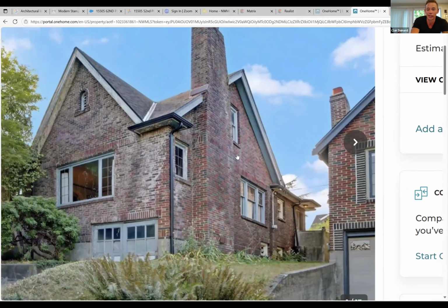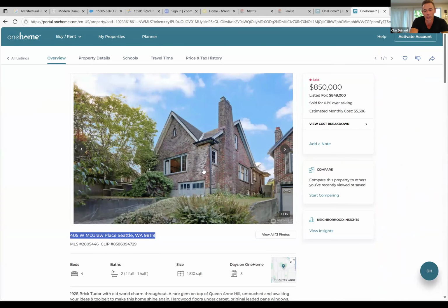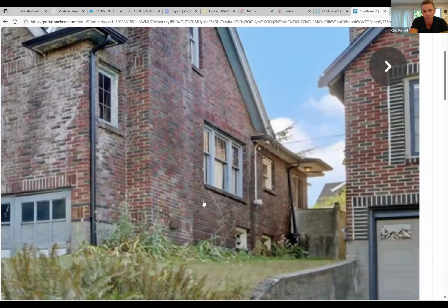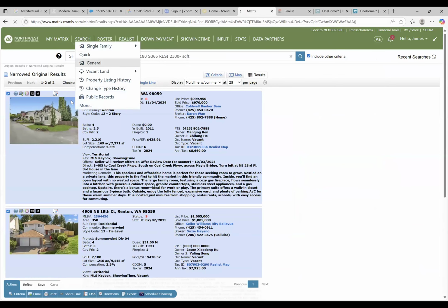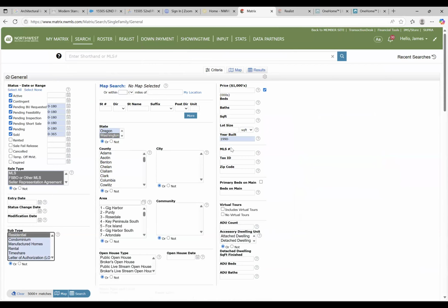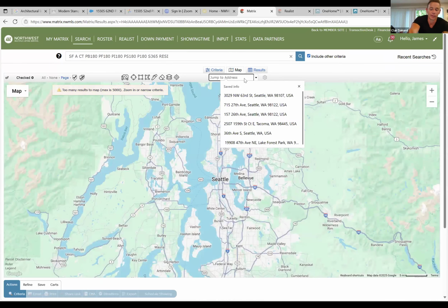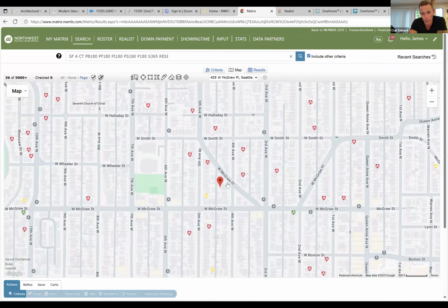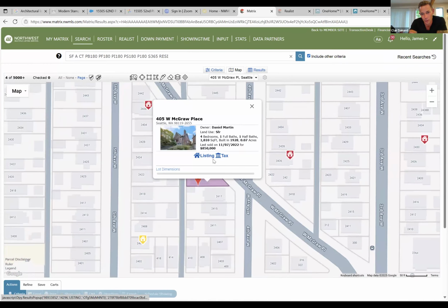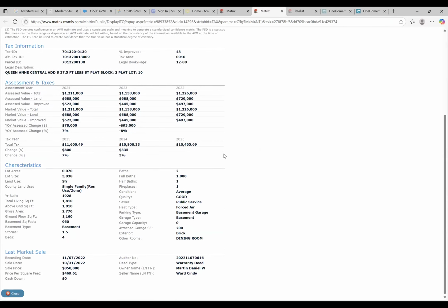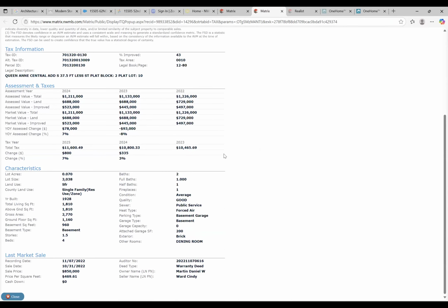You definitely got some tuck pointing issues on this house. That could be 40, 50 grand right there. What do you call it? Tuck pointing issues. Your bricks got cracking going on. Yes, I did mention that. That's the one thing that I've never dealt with. So 50 grand you're thinking? Okay, good to know. For that one I get a mason out, and it can vary quite a bit. Yeah, that was the one variable where I was just not sure at all.